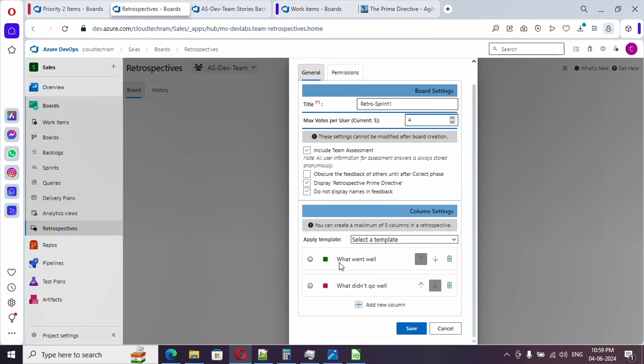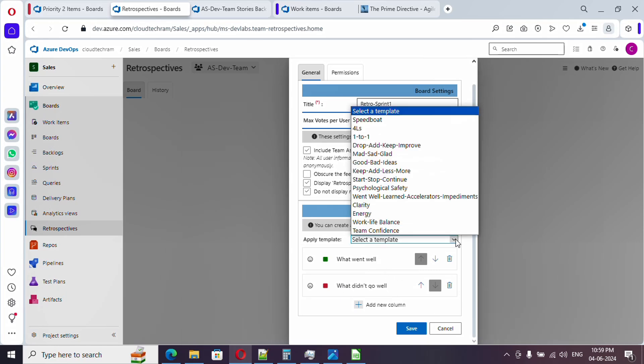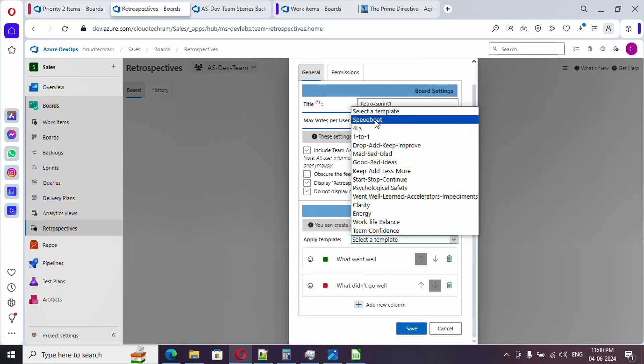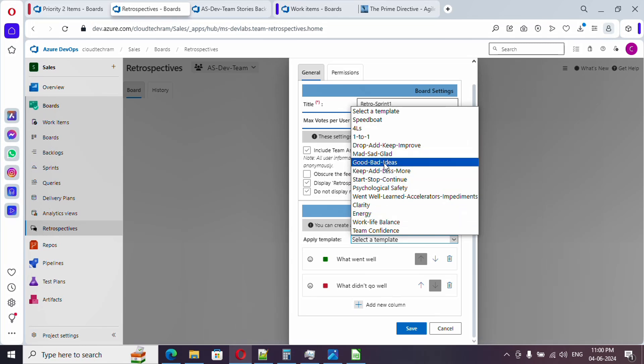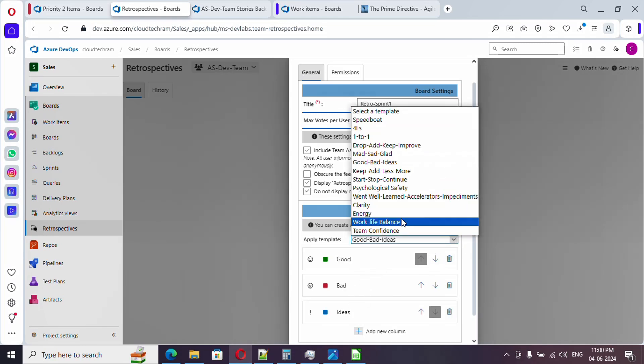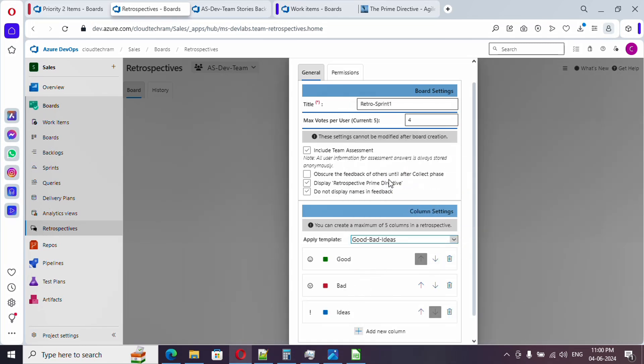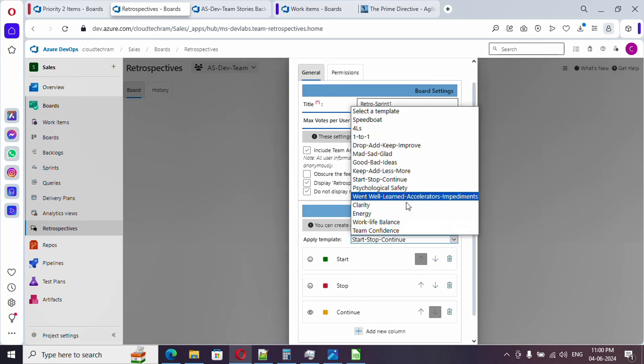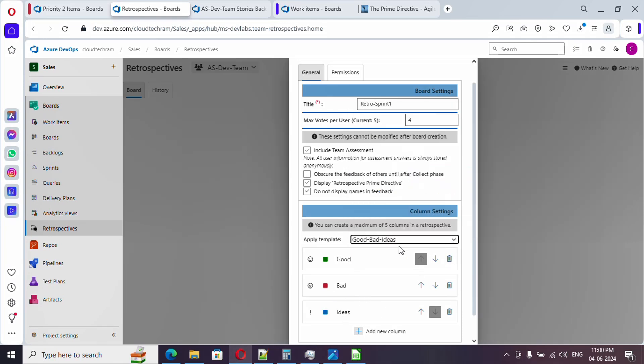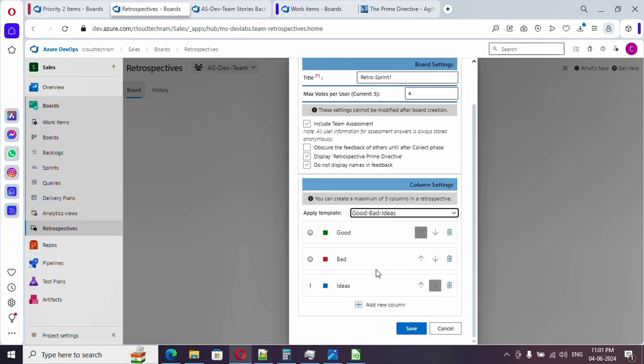Here if you come down, these are templates. By default it is what went well and what didn't go well in the sprint. These two options are there. There are various templates available, like good bad and ideas, or start doing, stop doing, and continue doing. I am going with good or bad ideas. In case if you want additional column, just click on this.